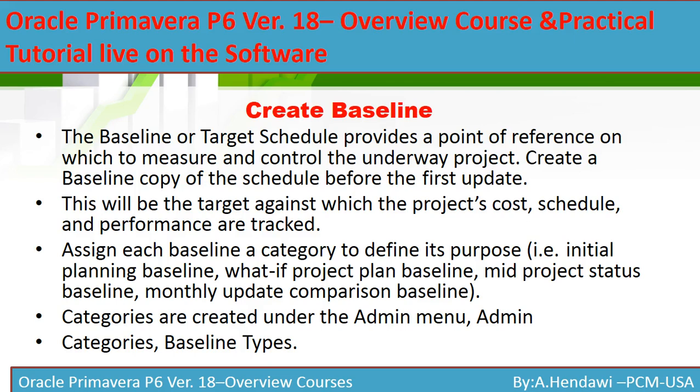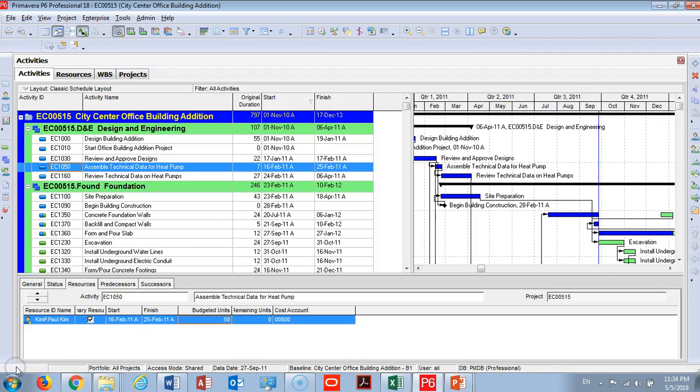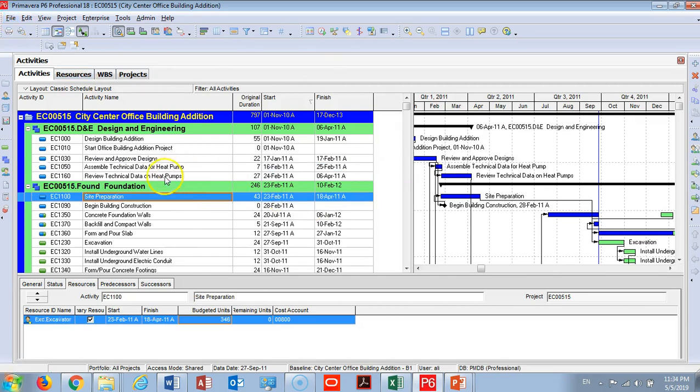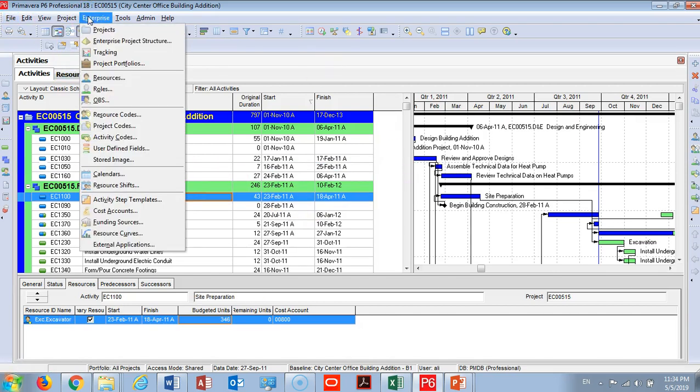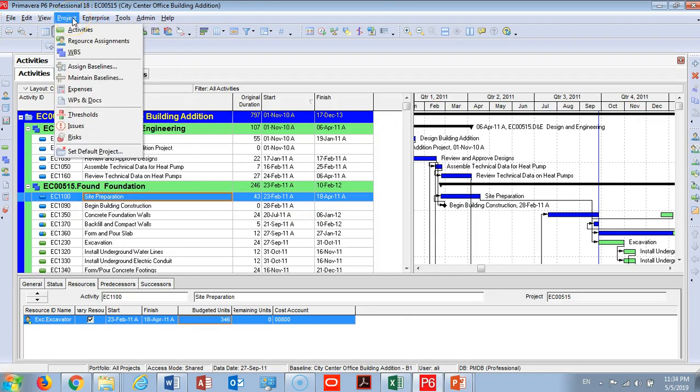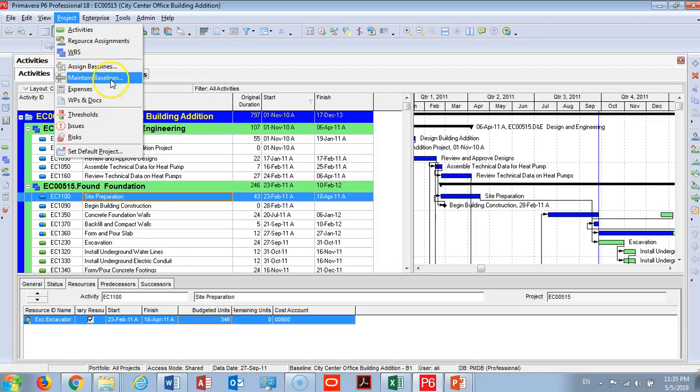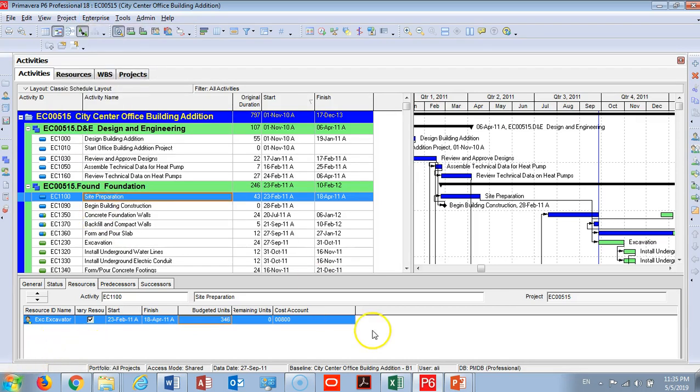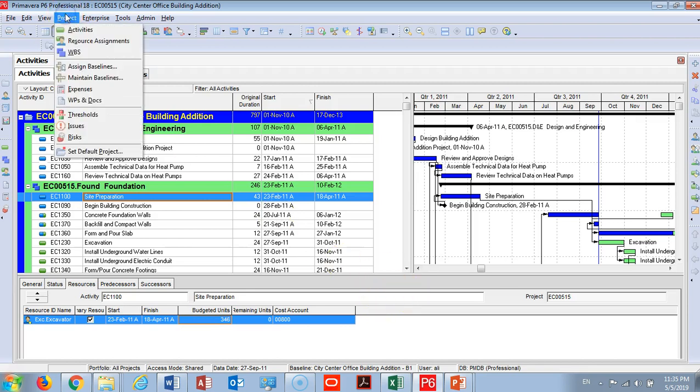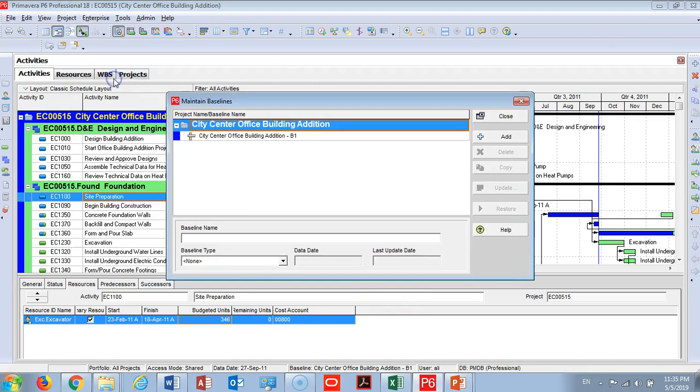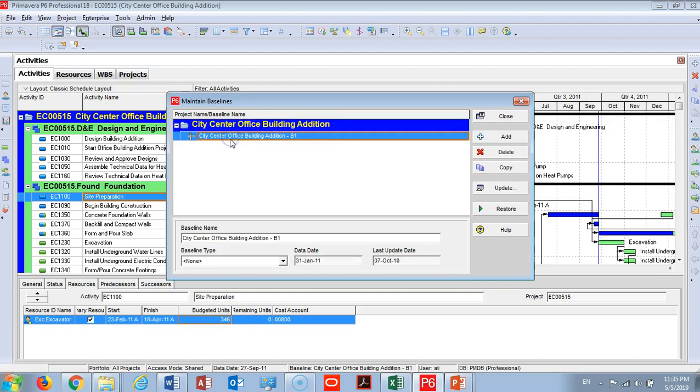There are many types in Primavera and you can assign multiple baselines. I will go right now on the live software to show you guys how you do the baseline. So here in the office building model that we are using for our training, I have now the office building schedule. I will go here under Project and you will find two important tabs: assign baseline and maintain baseline. Let me go right now to maintain baseline.